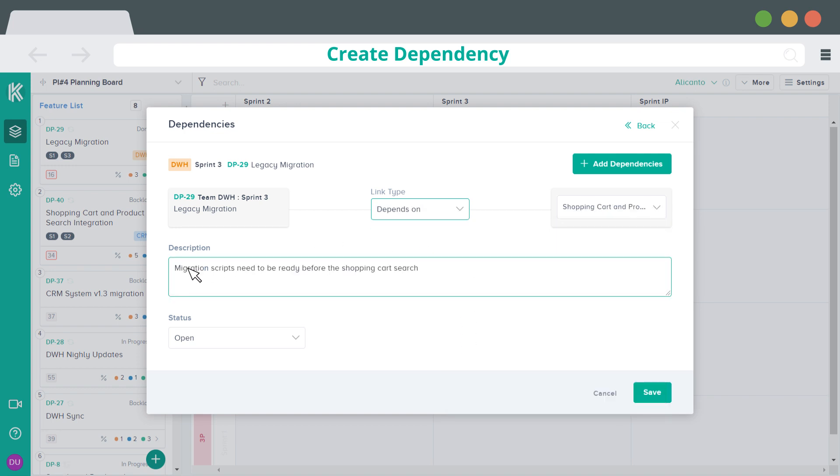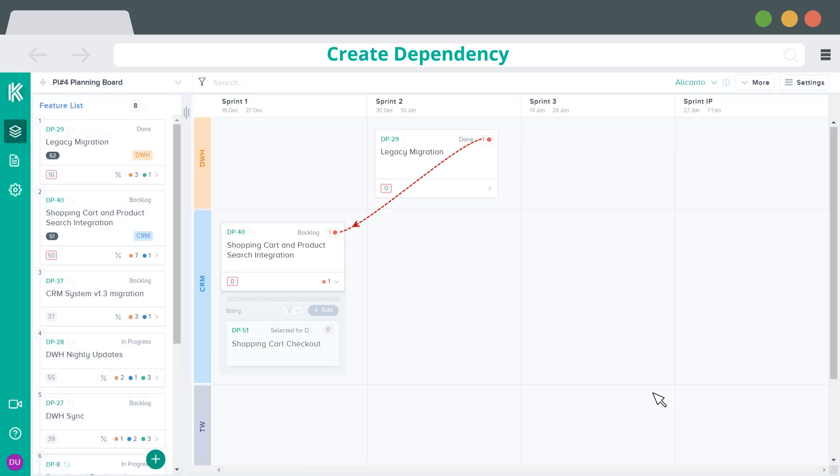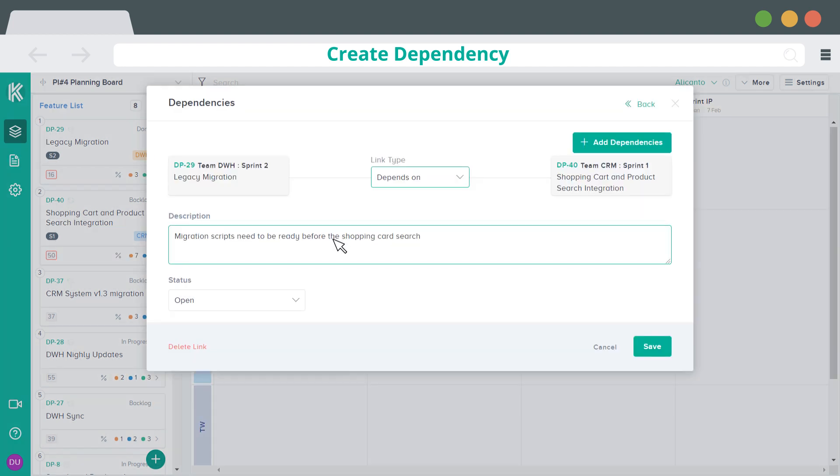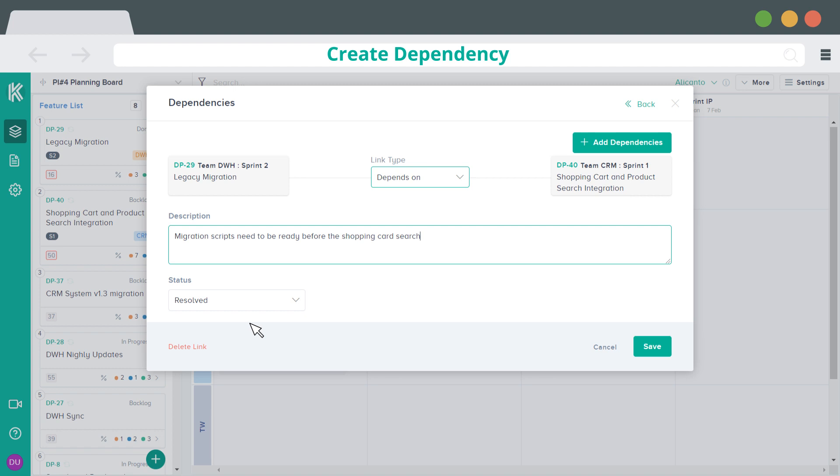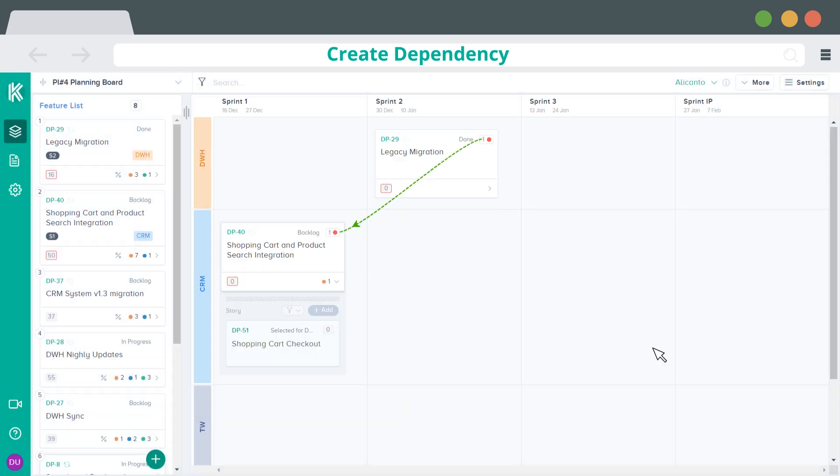Next, you can set the description of your dependency and the status. Once the dependency is resolved, you can change the status and line of dependency will go green.